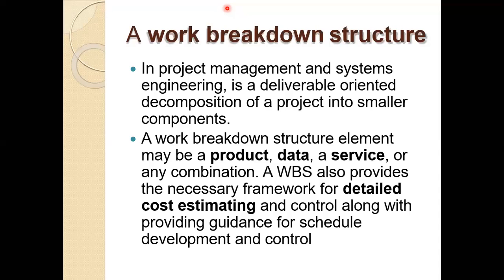If you are able to start a new task, no problem. Whatever your project schedule is, it is on the right track, and not a single day is wasted. But if your foundation work is not that good and you have to wait for the next 2 to 3 days before starting the next task, in that case you are lagging in your schedule.